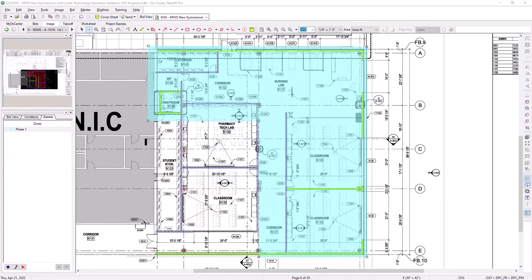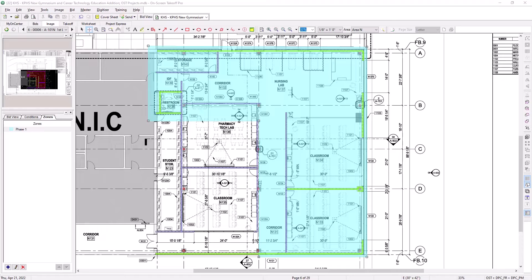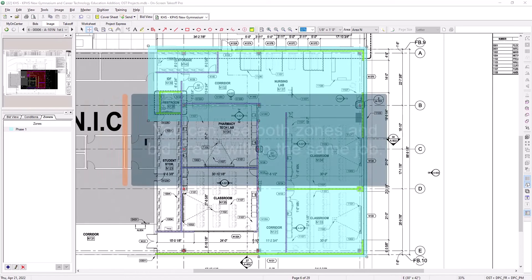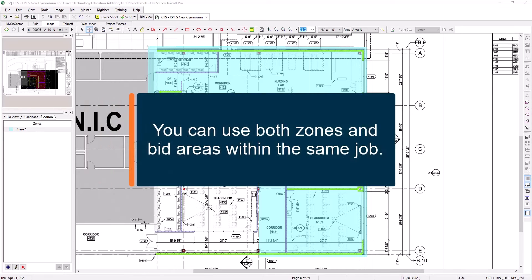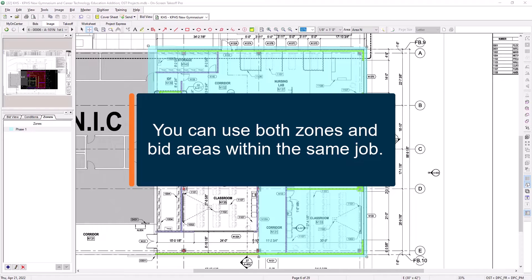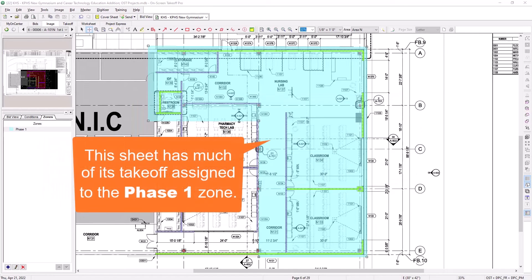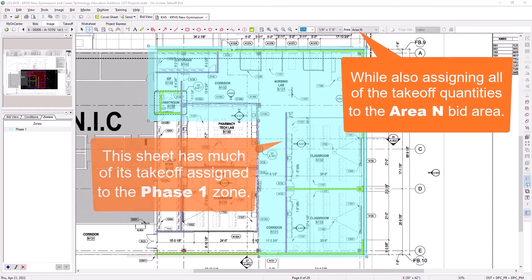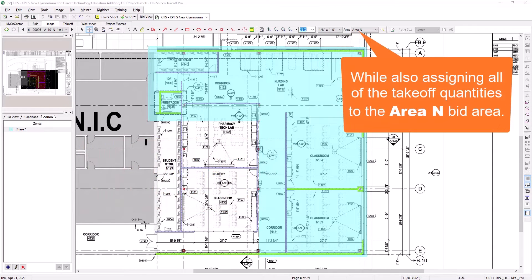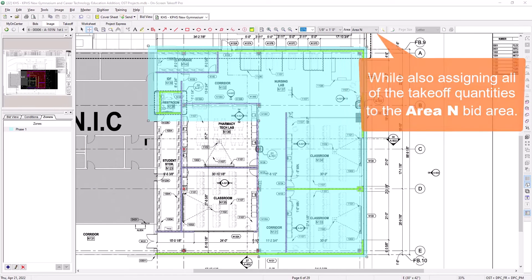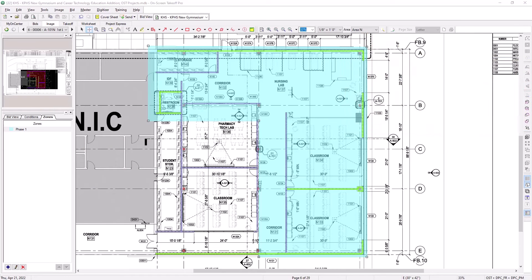We've mentioned some of the similarities and differences between zones and bit areas, but it's also worth pointing out that they're not mutually exclusive. In fact, they're often used together. It's common practice to use bit areas to group takeoff for the different physical areas of a project, like buildings or floors, and then use zones to account for phasing. By using both features together, you can break out the same takeoff in multiple ways.